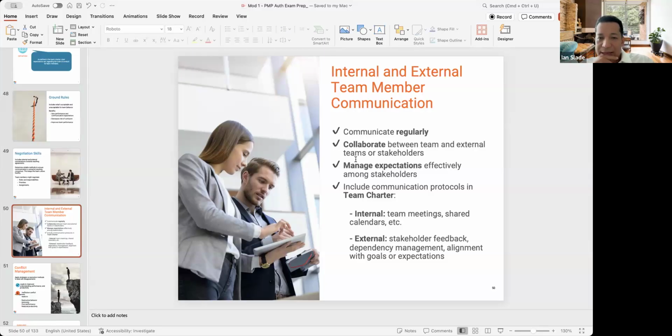Cool. So please, I'll give you guys a second to write that down, because that's also something I've heard students say comes up in the test. So push communication is something that you initiate, you're sending out. Pull communication is what the other team member or stakeholder has to retrieve themselves, right? Okay.